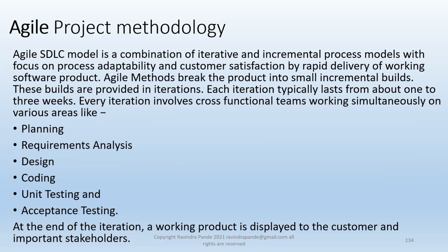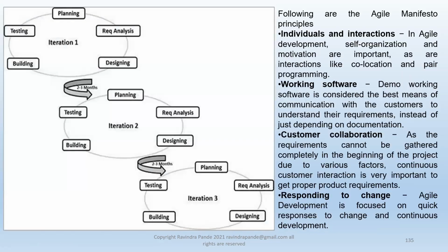So this way we are closely working with the client on an almost daily basis, and this is how the overall iterative process looks even today. So we have iteration 1, iteration 2, iteration 3. Iteration 1 can be anything between 3 days to a month's time. So you can have one sprint of 3 days, or a maximum 1 month sprint. Again, these are thumb rules.